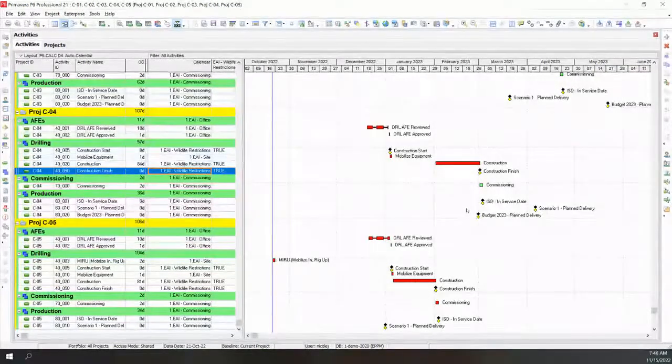Another one that we've done some calendar specialty work on is railroads. Often if you're on a live railroad line, you have to get on, do some of your work, get off, let any trains through, and get back on. So the calendars can be very complicated. We've done a lot of interesting calendar work with railroad clients as well. So that's some more food for thought.